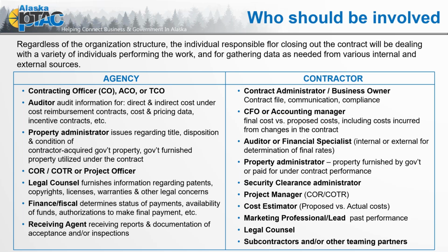Now, if you, throughout the process of that said contract, wind up purchasing new equipment, new desks, replacement desks, new computers, that equipment, as purchased under federal funds, may become government property at the end of the contract. So in the case of construction, if you have extra materials that you had included in your cost versus having extra materials that you had there just as part of a contingency plan, but if the government paid for the entirety of that cost, in essence, the government then owns those materials and that extra equipment. And so you can enter into a negotiation process of how that said equipment is disposed.